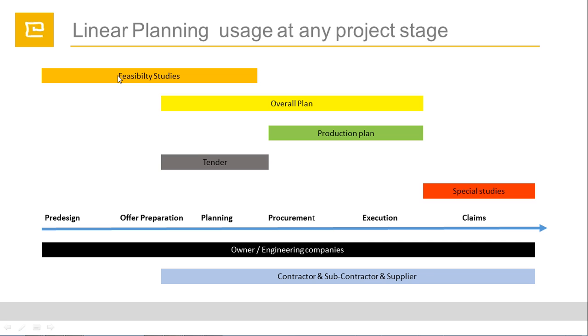too much uncertainty. But in TILOS, because TILOS allows you with 20, maybe even 40 activities, you can easily plan your project, because it is just the required start and end point, and you can prepare the plan with the feasibility study with multiple scenarios. It will give you an idea about the project budget and estimated duration, and that's why many owners are requiring TILOS at the moment in the tender phase.